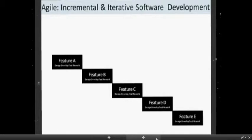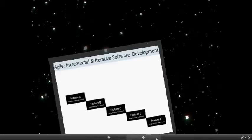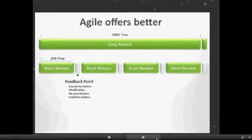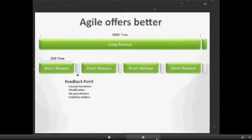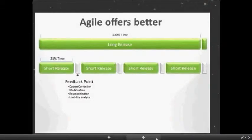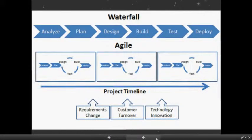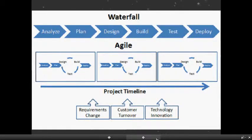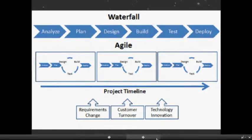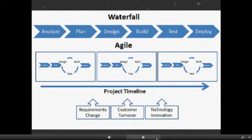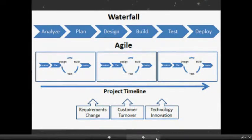When we come to the agile development, you will still do same type of work as you would be using in the traditional methods. You create requirements and designs. You develop your product and you integrate your product with other products as necessary. You test the products and deploy them for use. But the difference in agile development is we first look at only one feature. We go through all of these stages to develop this feature. After developing this, we move to the next feature.